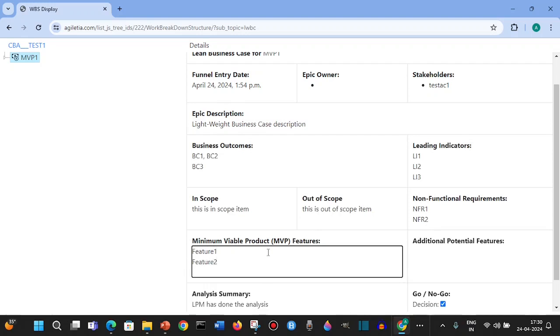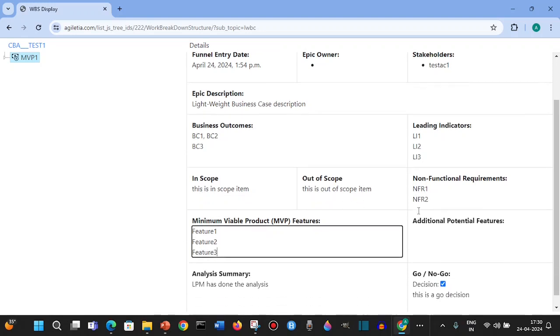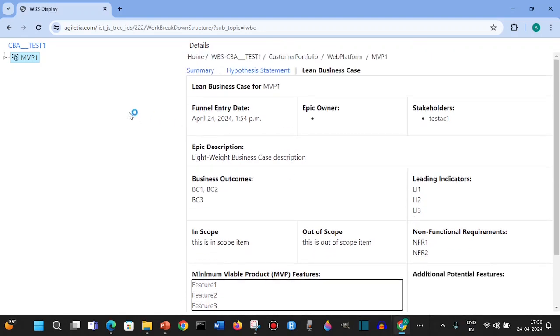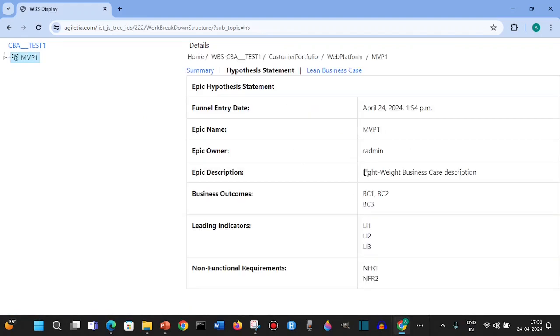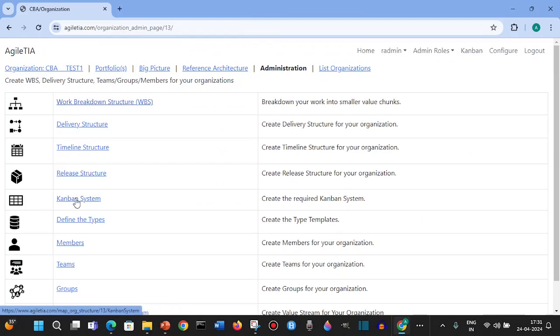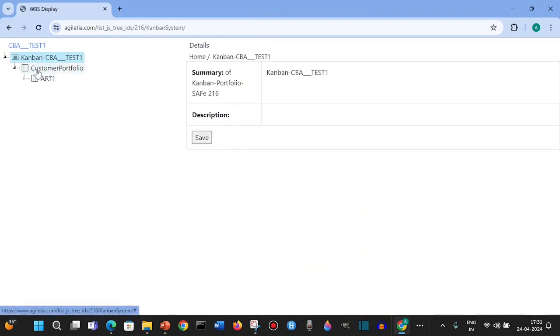All those things you can fill in. Once this is done, this approved item can be moved into the Kanban system. This hypothesis statement has all the details. In the Kanban system you can see the ART defined - this is the ART for this portfolio and there are four teams.